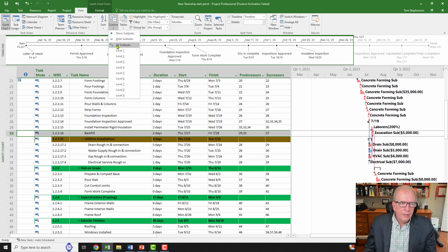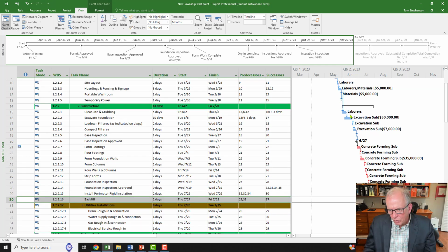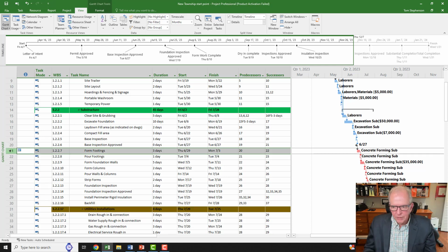And I believe that's all of the work breakdown structure that I've got set up. So that's good. I've checked the work breakdown structure. I'm honing in on this constraint here because it's bothering me because my critical path before it has disappeared. When you put a constraint, Microsoft Project thinks you don't have a critical path anymore, especially when whatever you put it on is affected by what's before it. And so it kind of just goes blue. So if you're having your critical path, I did another video on why did your critical path disappear. That's one of the reasons.